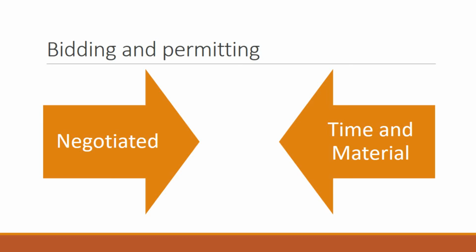The magic number that seems to work best for obtaining the lowest market rate appears to be having 3 bids. One will frequently be much more fiercely competitive than the other two. But one should take a precaution: if one bidder's offer is significantly less, carefully go over the scope with them, because a hostile environment later serves no one's interests.